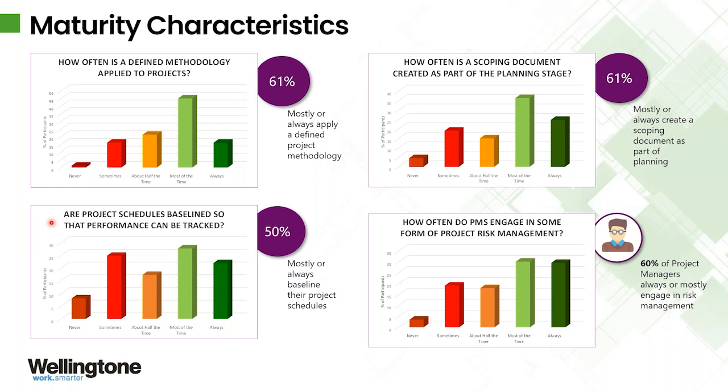Of course, is that plan going to be perfect? Of course not. But what we should be doing is, as the project progresses, updating that plan to reflect reality, what's actually happened. That probably gives us more information about our future forecasts, and we might tweak those as well. Now we've got 10% of the way through the project. On reflection, some of our estimating has been a little bit under or over. And then we should be comparing that current plan to the original plan that we put together, which we call our baseline. How are we doing compared to our original plan?